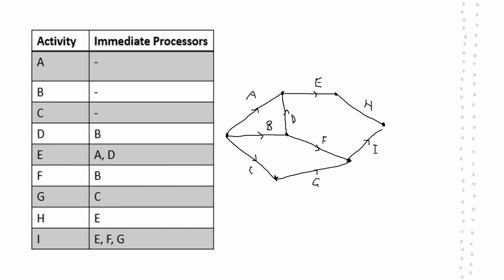All right, so this is where our issue is, that I comes off of E, F, and G. Now, currently with our structure, that doesn't really work, and if it did, we would be creating multiple edges. We would also have more edges for E than just one, so that's something that we can't have. So we need to put a dummy in here. We need to put it in the appropriate spot.